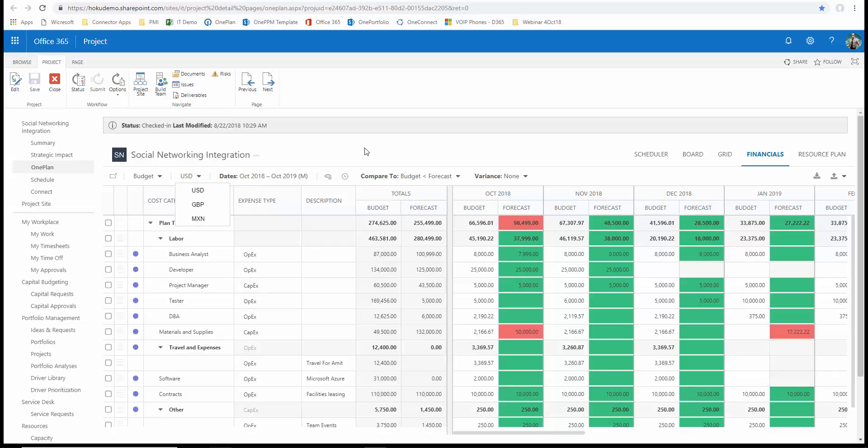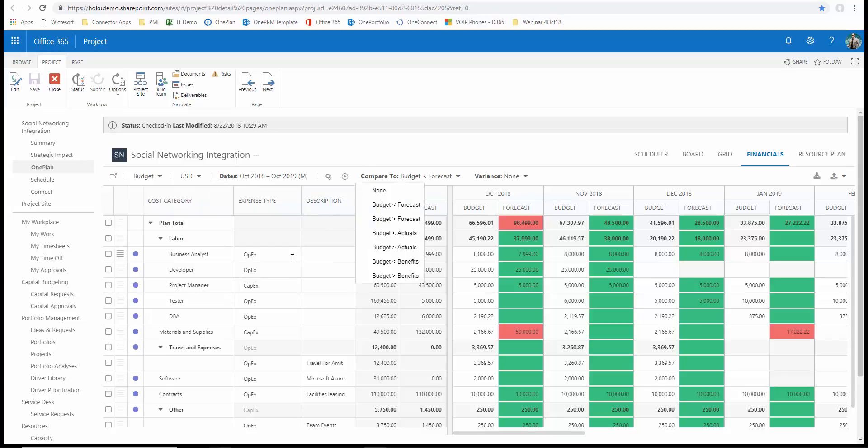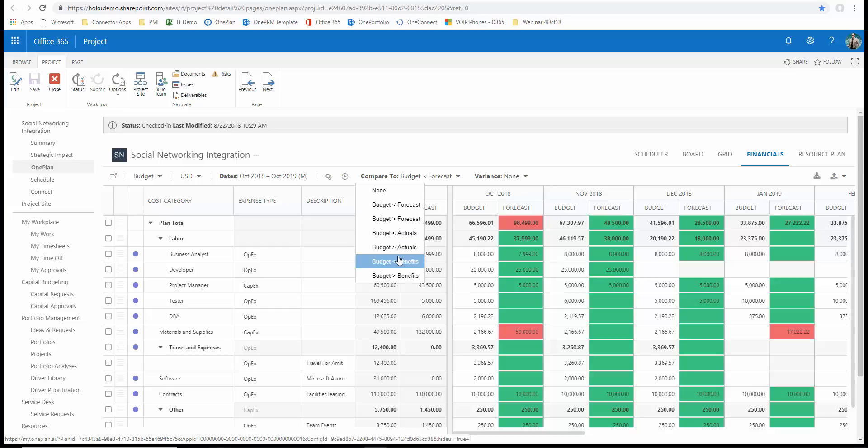Also, these financials can be fed from the resource plans we discussed earlier, so that the financials around labor could come from the financial plans that we put in here earlier on. And we can also compare the cost types so that we can have comparisons and heat maps of whether or not, for example, our forecast or actuals are running ahead or behind of our budgets as we go on through.